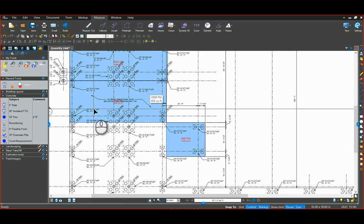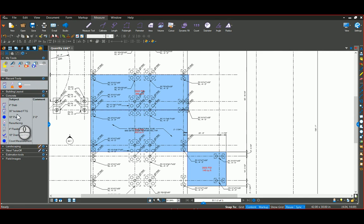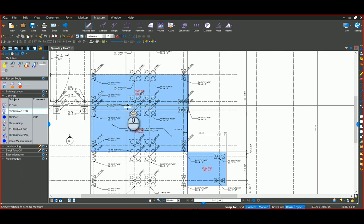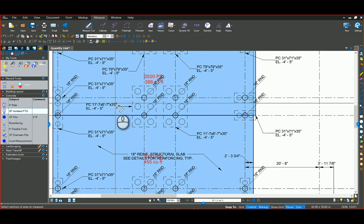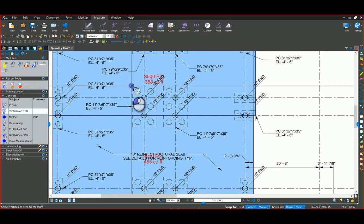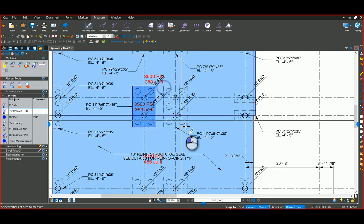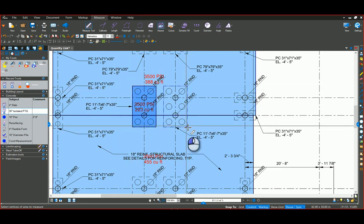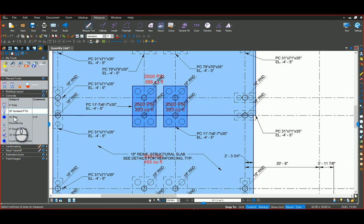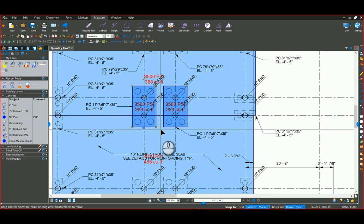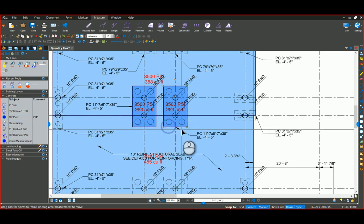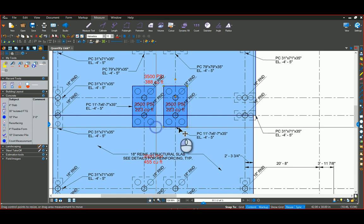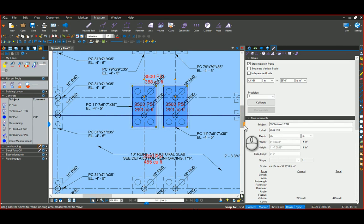Then I'm going to go ahead and do my 35 inch isolated footings. Those I know are 35 inches. That's what it calls for on the plan. So I'm just going to come over, trace those. You'll see that it's recording the cubic feet on there for each of those footings. I'm going to double check these before I get the next one. I select both of these. I want to make sure that those were set to 35 inches. Yep, they were.